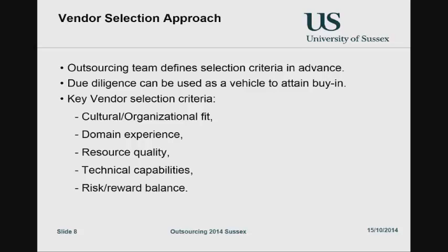The second reason why you do this is that you don't want to do that during the bid process. So you have all of these bids in. Oh, which one's the best out of all these things? I'm not really sure. No, you set down your criteria before. What's the price I want? What's the way I want it delivered? And so on. And it also helps you, at least to start, an objective evaluation when all of these bids come back to you. So you do it for two reasons, yeah? Kick out the ones which are no-hopers, and be in the process of evaluation. You are already right up front thinking about how am I going to select this particular person.